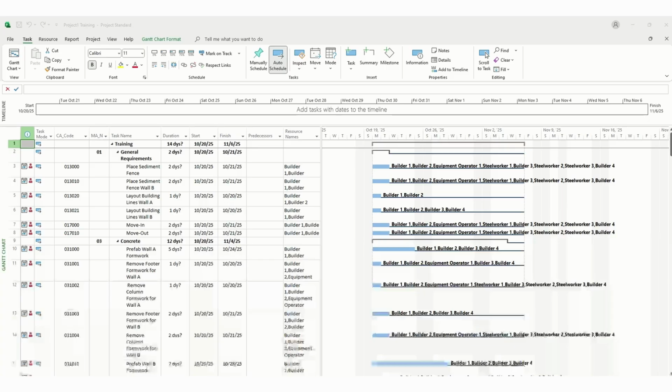Project scope sheet. Project scope sheet is a major item. This will basically outline the project. You want to know who the customer is, who's the design of record. We can put in here that CNIC is the customer because it's a facilities project. The DOR is NAVFAC. Okay, and then who generated the BOM, the date you guys went on site, a brief description of the project, which you can get off of your frag or tasking letter.